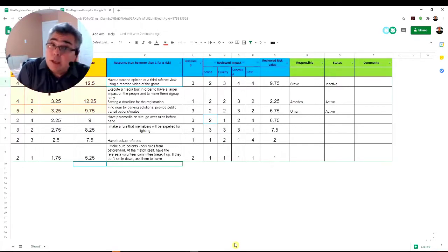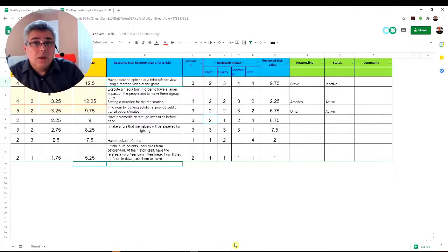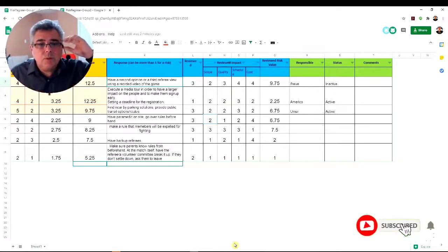Sometimes I include another risk if something happened. Maybe you change the person that was executing the task. Before, there was someone very experienced, and now it is someone who does not have that experience. So it may add some risks in terms of duration. That person may take longer to do the task.